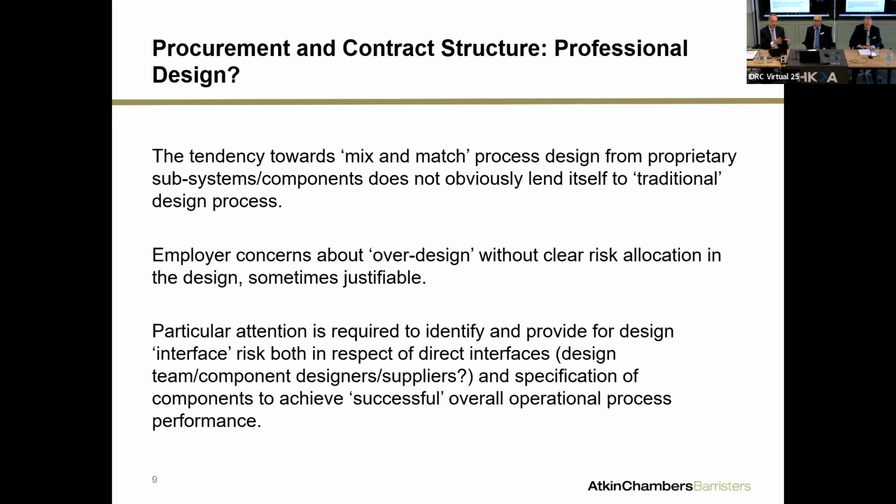It's something that developers need to think about, because not only is there this alternative concern that developers have about potential for over-design, conservative design, which again can be justifiable in certain circumstances, it seems to me there's a problem with this mix and match component-led building of a process. It does require developers, design teams, contractors, lawyers to think about how the interfaces between that sort of approach to procurement work together with the chosen design team and the level at which you are going to farm out, if you like, aspects of design to component designers, suppliers, and manufacturers.